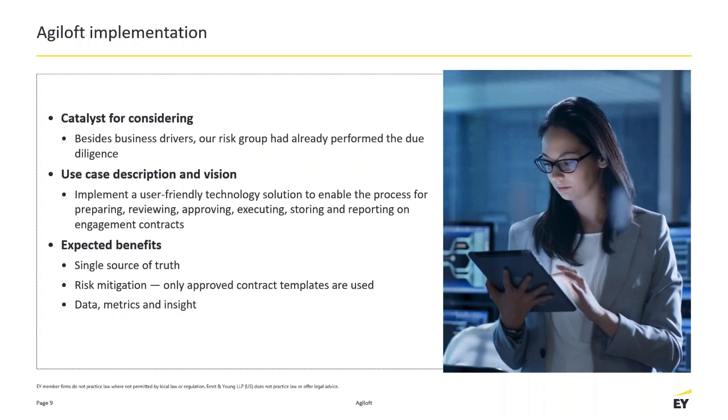Because the other piece of our puzzle is that at the time, 2017, when we were considering this, the whole idea of software as a service, cloud hosted, any of that, was just not part of our language at the time at EY, really, for an application like this. We needed an on-prem solution, and Agiloft was able to provide that. And we have a relatively complex IT environment, and I knew that was potentially going to impact our schedule, but I didn't realize just how much it was going to impact our schedule.